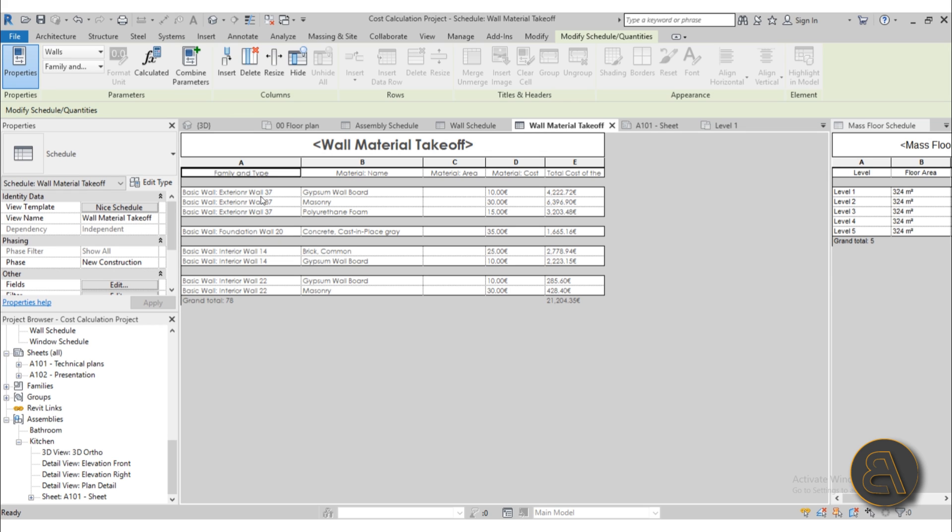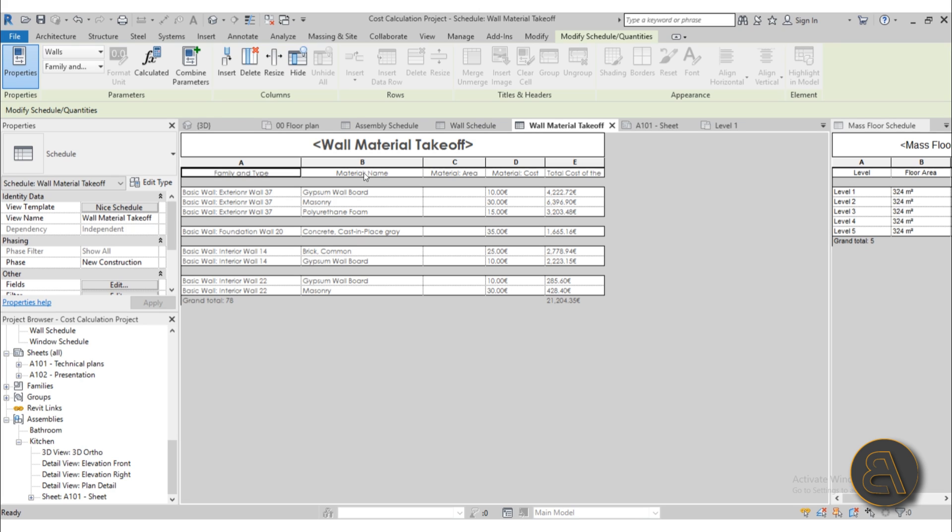So here for this exterior wall I have gypsum wall board, masonry units, as well as polyurethane foam. Then we assign a cost for each of those materials and then Revit does the rest of the work and we get all of the calculations. Also if this schedule looks kind of nice, that's because I show you how to fix up your schedules and how to set them up, so this isn't only cost calculation in Revit but also some tips and tricks on schedules in Revit.